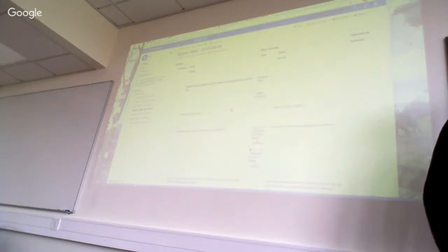I would prefer that we have rather less functionality, but look at the whole system. So you have a little bit of server working, a little bit of client working, so you have a kind of a path through the whole technology stack, rather than just being at the client, where maybe you are further in understanding the client than the server. The disadvantage is that you have no idea how much it will take on the server, so it's hard to estimate the next sprint, unless you have more in-depth understanding of the server side.